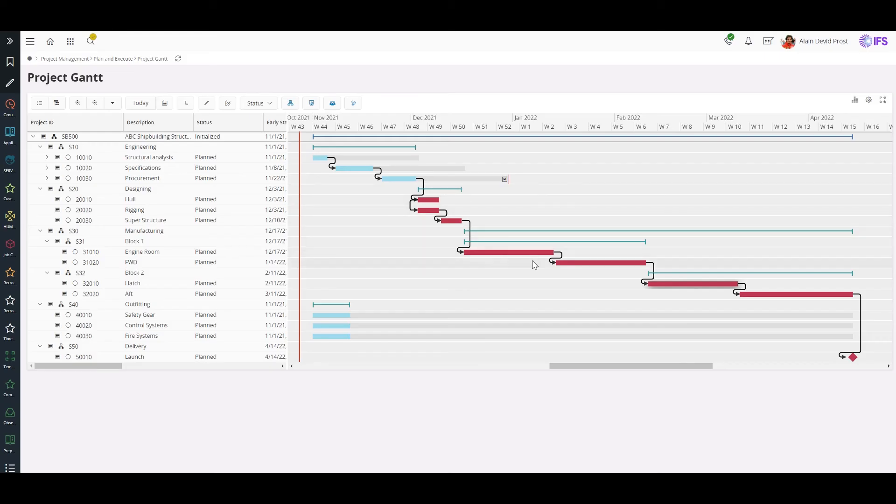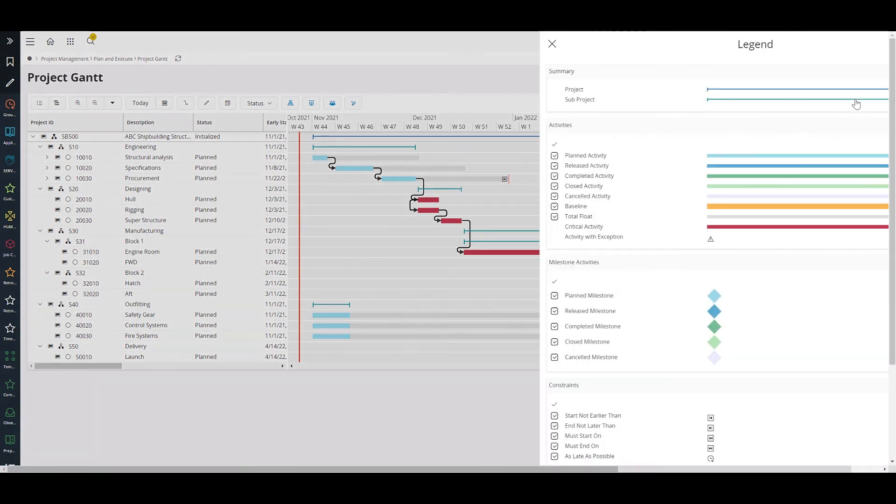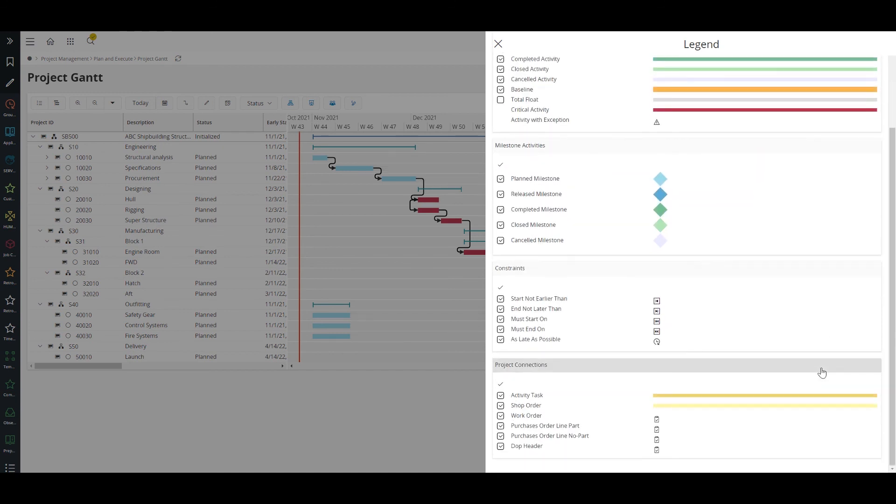Now we can see the critical activities of the critical path in red and the float calculated for non-critical activities. To simplify my Gantt view, I'll hide the float for the moment and I can do the same for constraints or activity tasks as well.